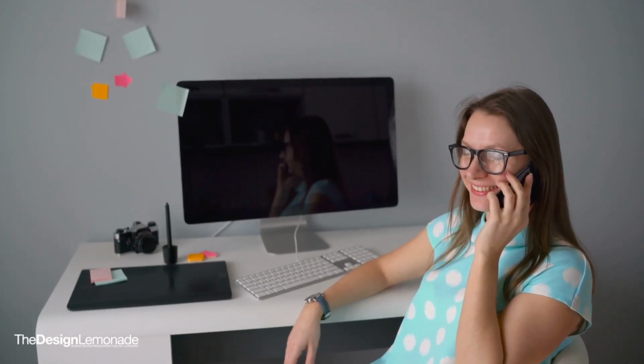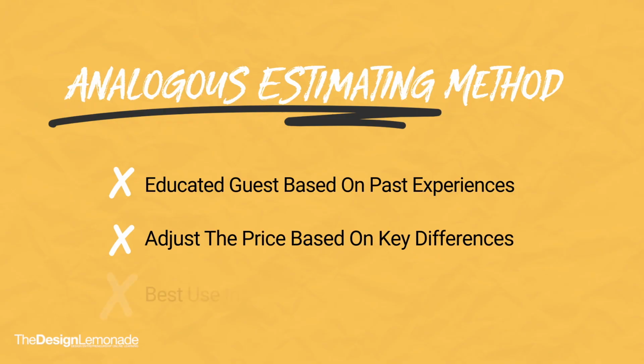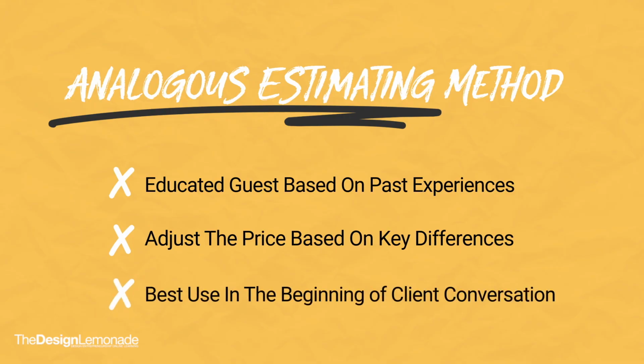So, when is the perfect time to use this method? Analogous estimating is your best friend in the very early stages of a client conversation, when you need a rough order of magnitude, a ballpark figure on the spot.